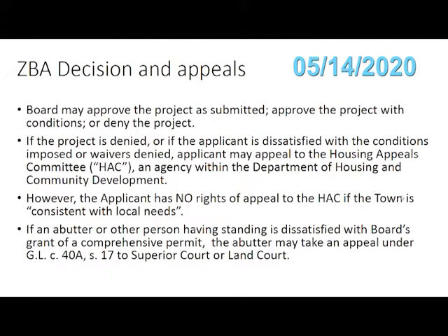No, can I just interrupt for a second? Sure. So the Board of Appeals rendered its decision, let's say last week. The developer will have 20 days to appeal that decision to the Housing Appeals Committee, and the abutters will have the same 20 days to appeal that same decision to Superior Court. That appeal, the abutters appeal, is the one that is now going to be on ice until the developer's appeal is exhausted.